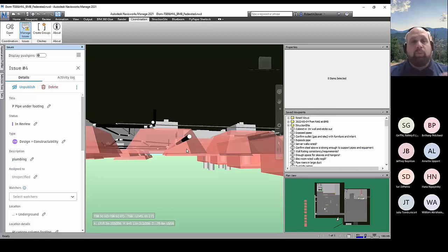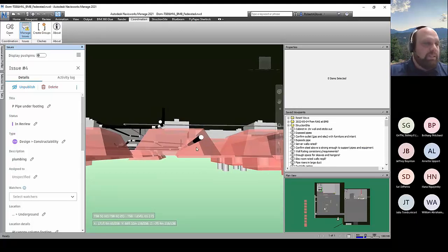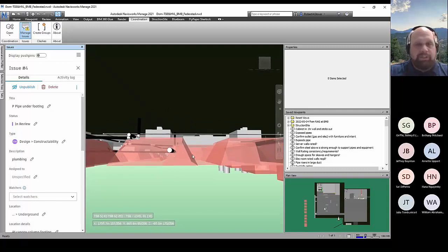So what I do in particular is I'll go through the model and look for constructability issues, things that may be a problem when we get to building. For example, here, these pink things under these footings are called zone of influence boxes. I've never seen one on a design team that I didn't put in, but they're dead useful when it comes to coordination, because nine times out of ten, there's an area under that footing you can't touch. Don't disturb it, or you undermine the footing.